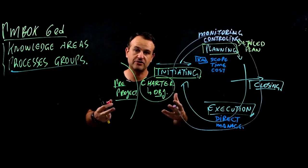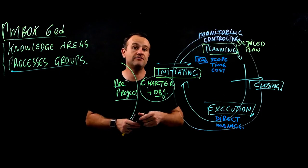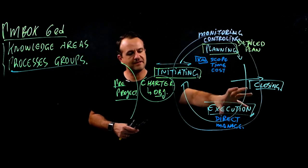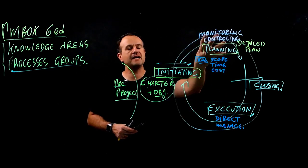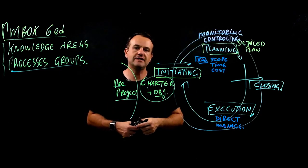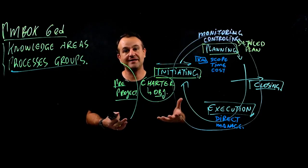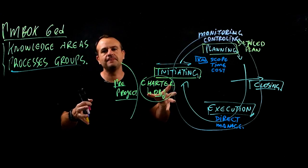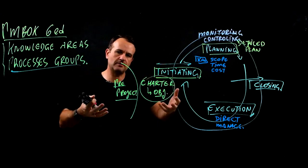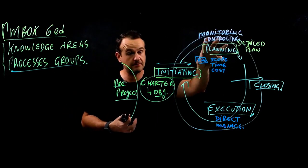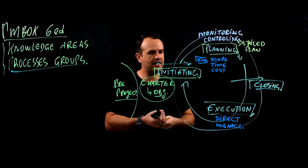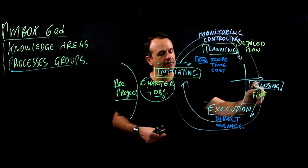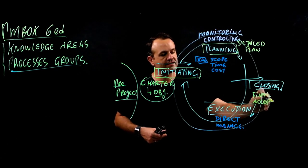In Monitoring and Controlling we manage changes, we manage documents, we manage all the aspects — not only from a performance point of view (whether the project is behind schedule, ahead of schedule, spending more or less), but also managing change. Every time we have a change, we need a change management process called Integrated Change Control, where we identify the impact of the change, go through an approval process, update the plan, and then execute. In the end we have final acceptance and closing.